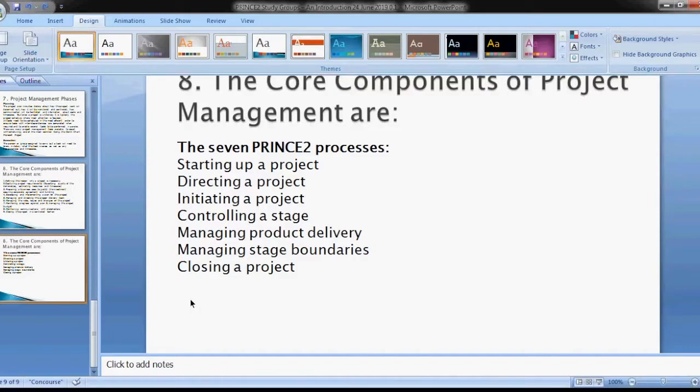So you need to ensure that the times you have agreed, your baseline times, you've not missed the date. And if you're about to miss the date, at least it is escalated to the senior management for them to be able to make adequate decisions on the next line of action or next steps.